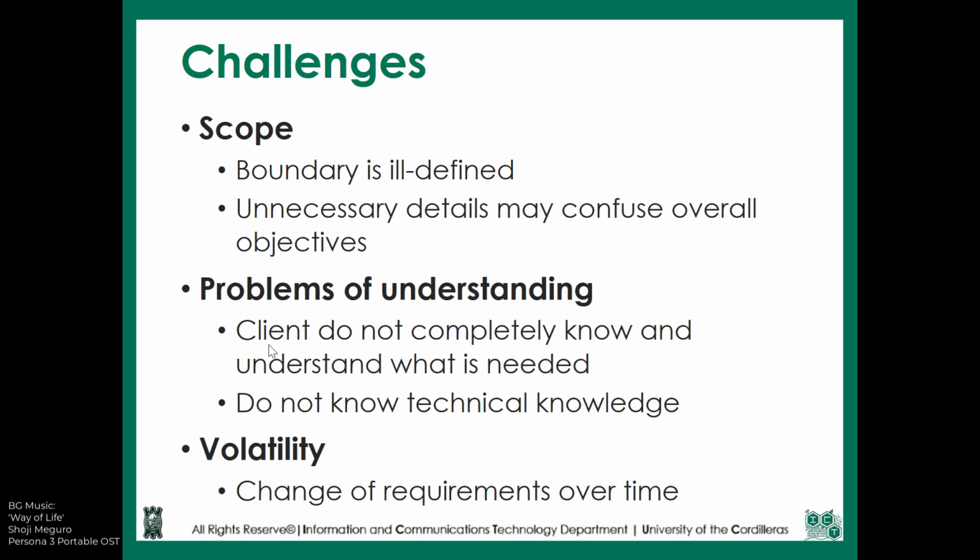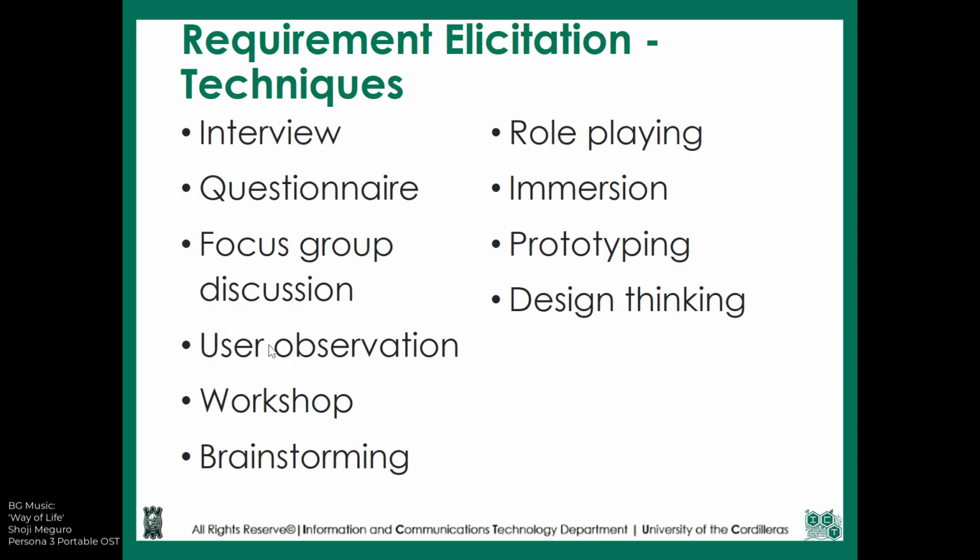So it's your responsibility as a member of the project management to let them know that these are the constraints that you have, and if you keep on looking into them, that would be a waste of your time and your resources. Yet at the same time, when you're going to create a project, there are some things in the planning and initiating stage that you don't necessarily think about, and once you're already building it, you realize that it's something necessary. So the change of requirements isn't necessarily bad. However, changing it so much might affect the overall cost, the overall time, and other project constraints.